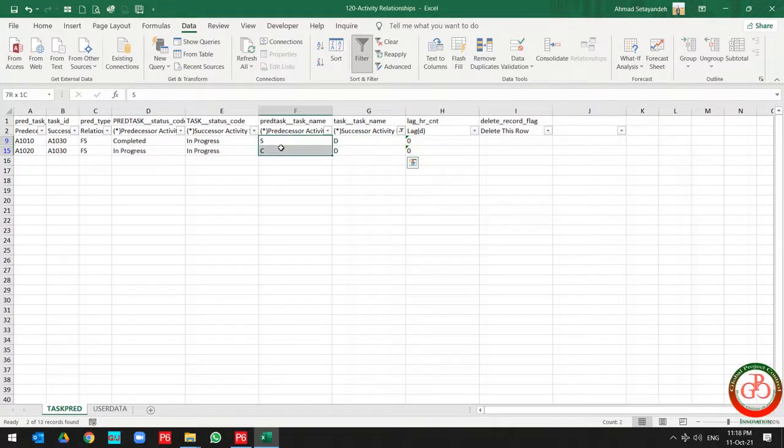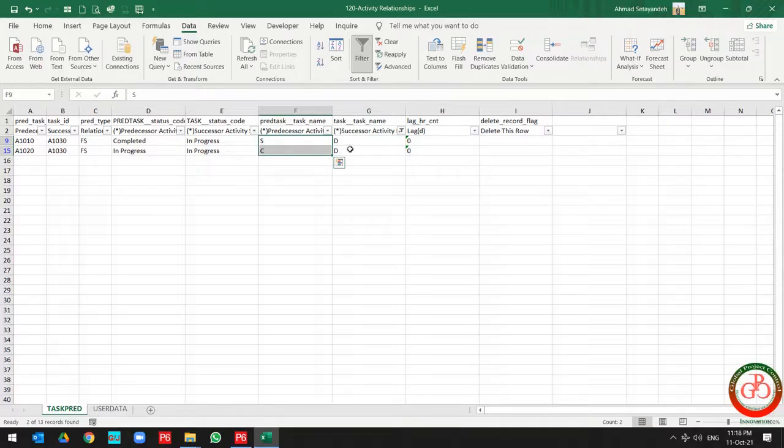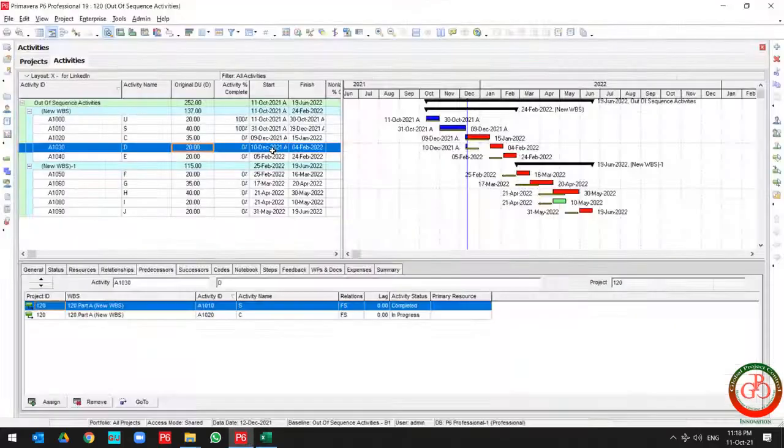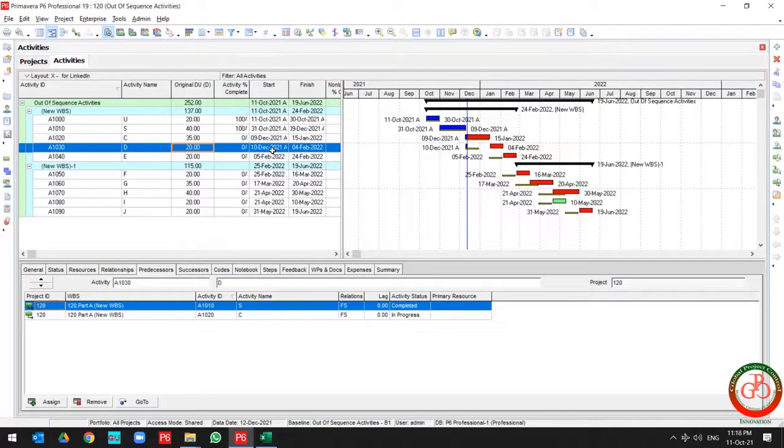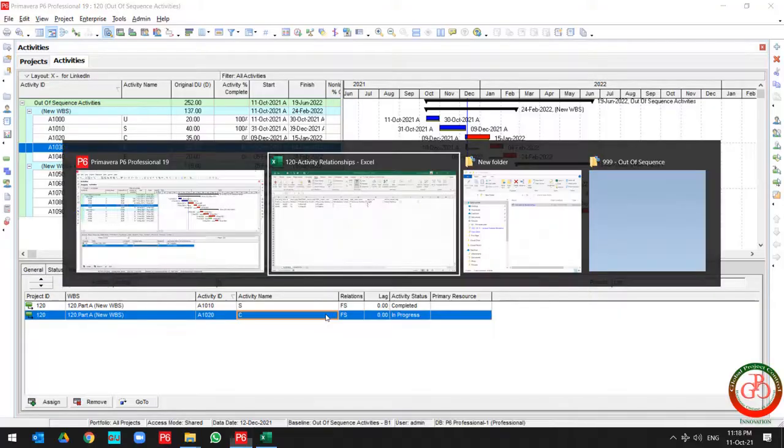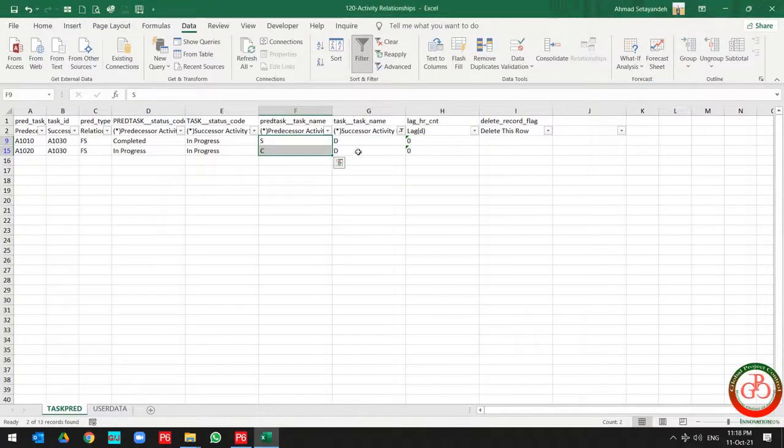And task S and task C connected to task D, but the cause of out of sequence is the task connection between task C to task D. Over here.